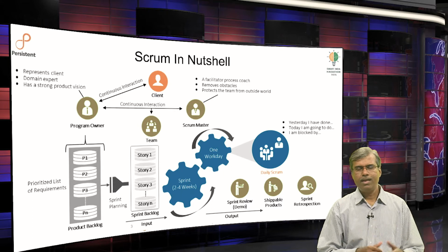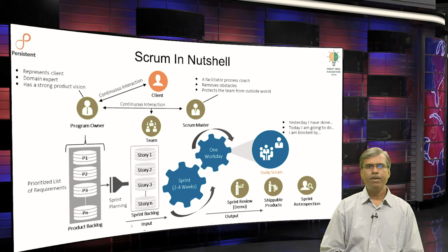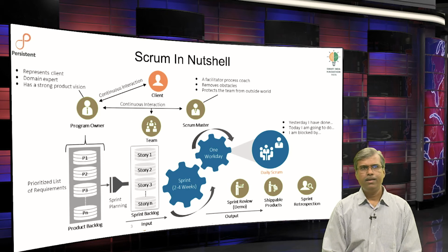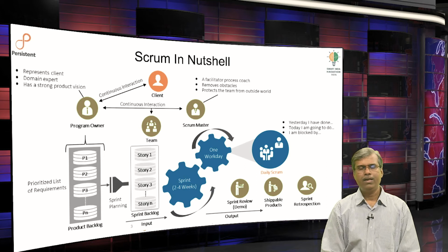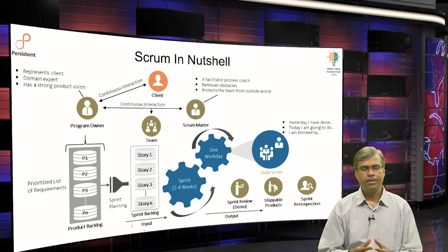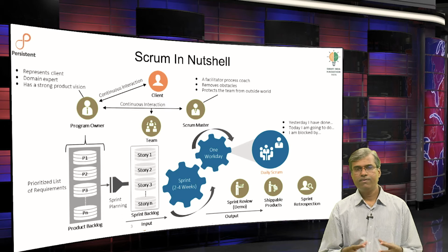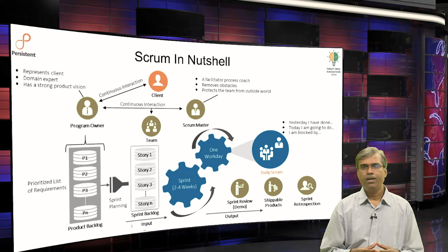Once the backlogs are created and established, the team gets into a grooming meeting. A grooming meeting is nothing but a meeting to understand what the backlog really contains, what those requirements are, and if the team has any question about those requirements, about their implementation, about the understanding of how a particular requirement could be implemented, that kind of discussion is facilitated in the grooming meeting.